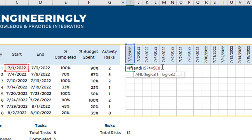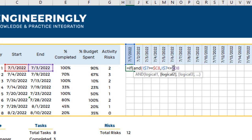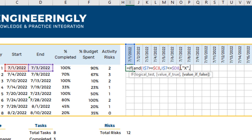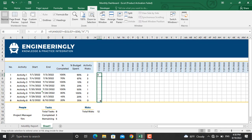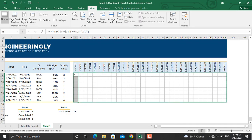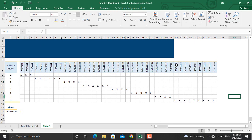I'll put a comma, and the next condition will be: if the header date is smaller than or equal to the end date — locking the column. Close the AND parenthesis, comma — if true, in quotes write X; if false, leave blank. Close the parenthesis and press Enter. Now I'll drag the formula down and to the right until the end of the project. I also had to extend the dates to August 10th and drag the formula to cover those columns as well.